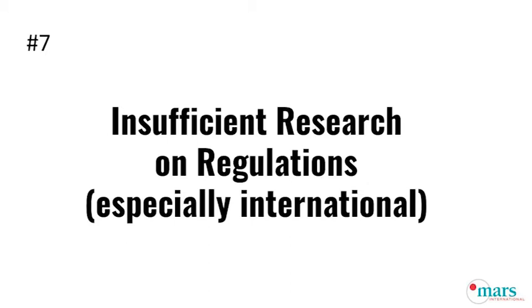Unfortunately, sometimes that is not adequately researched, or more frequently, we're fine in the U.S., but then the customer who said, we're not planning on selling it in Europe, or even Canada, our close neighbor, which will often have different regulations, they'll say, don't worry about that, here are the UL regulations, and you need to worry about the FDA, et cetera. But then they want to sell it in Europe, or in Korea, and all of a sudden the product is not legal over there. And we have to go through a lengthy and costly redesign process in order to make it work.